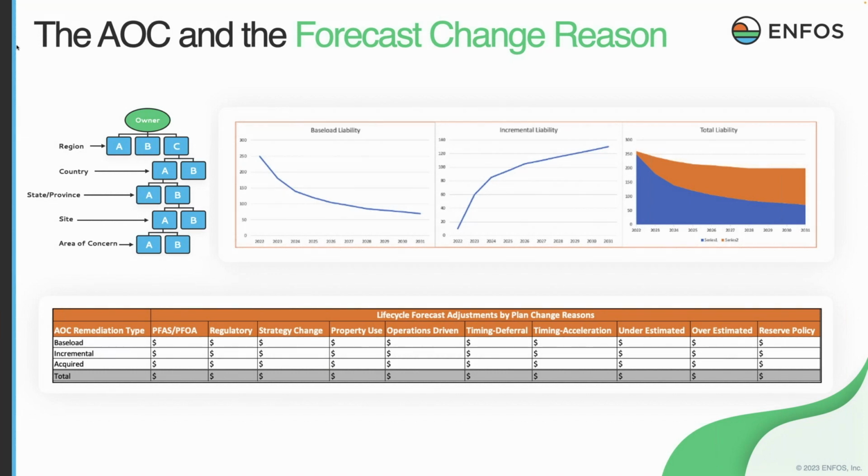The base load liability, as you can see in the graph, typically goes down at some kind of a rate based on spending, right? It's usually not dollar for dollar, because cash efficiency, if you're at a 1.0, is very, very good, not always feasible for early stage projects. But I can do a spending analysis just on my areas of concern that are in my base load liability.